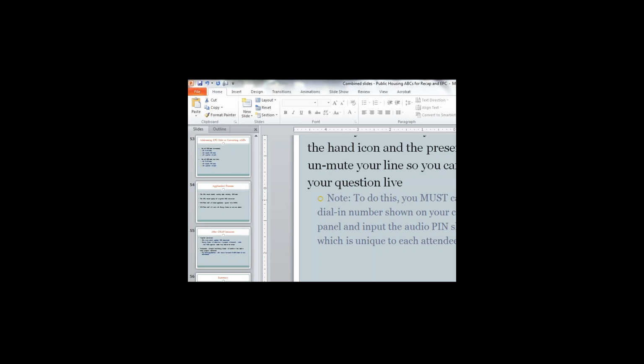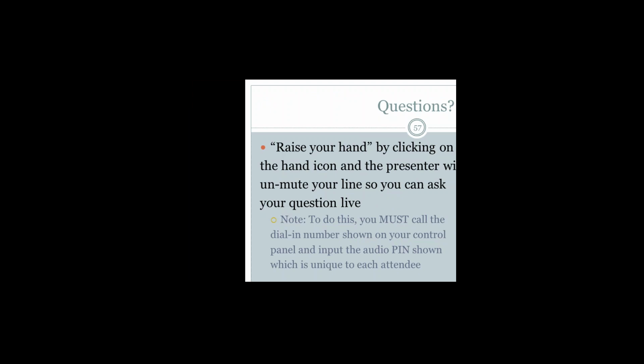So what the Energy Center will do at that point is say, okay, your original assumptions when you came in 5, 10 years ago for approval of this EPC were that you were going to be able to pay off the project in 15 years. But actually, it looks like your project was either really high performing or really low performing, and so you need more time or less time to pay off the EPC. They're going to double check the architecture engineering analysis to estimate how much more time you need in order to pay off the remaining debt that you have.